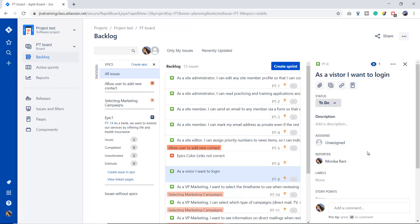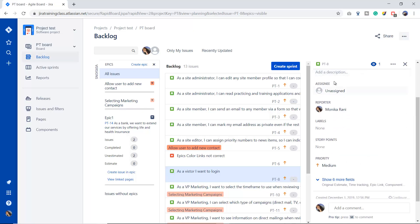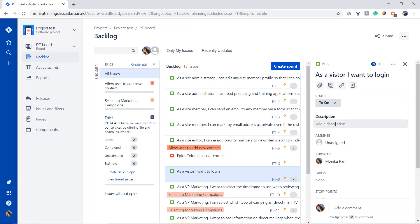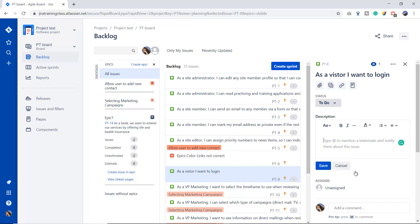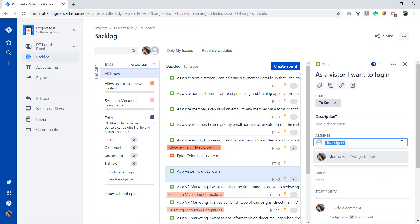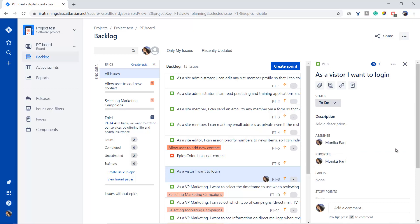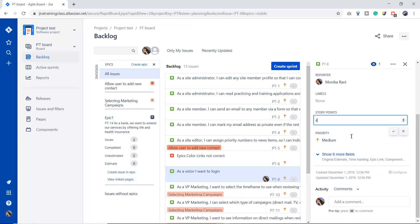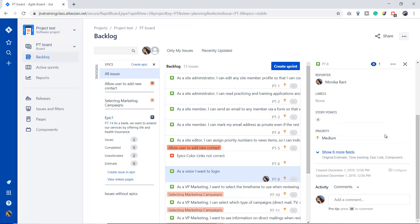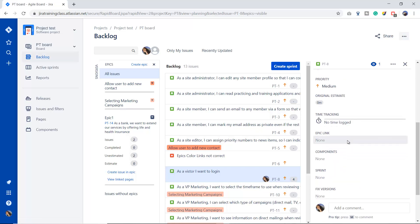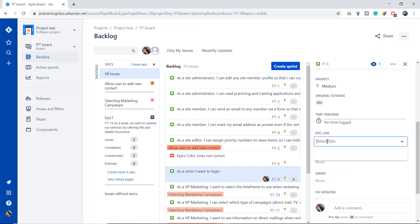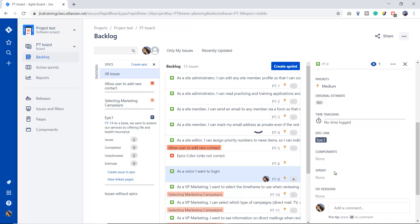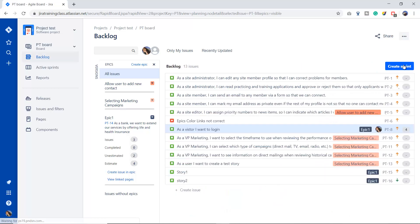How can I connect it? You can connect it this way: click on the story, it gives you a detail window where you can see the name of the story, the status, and description. You can write down the description here and assign this story to users — I'm going to assign this to myself. I'll estimate this story with story point four. Once you click, you can see the 'Epic Link' option — you can click it and find our epic: Epic One. Close it, and now 'As a visitor, I want to login' — story PT8 — is linked to Epic One.